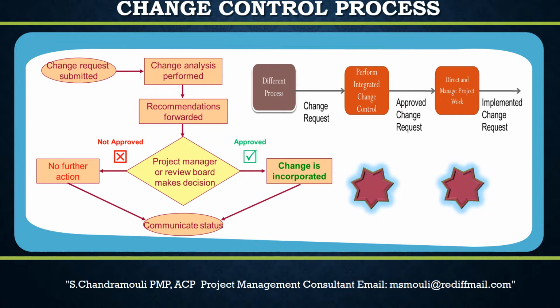Number 4. If customer still wants the changes, discuss with the management sponsor and other stakeholders. Number 5. Based on their inputs, if the change is warranted, a change control will need to be formally opened, necessary approvals received, and then the team can work on the required changes.